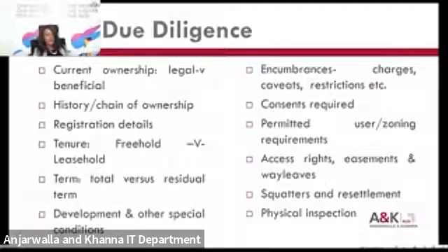And also they have to factor in and work out with the government the relocation and the alternative land that will be given to relocate the squatters and other people who are utilizing the land that is required for the project. And in some instances where this is not done right, and the people utilizing the land are not consulted, it does cripple the project, because there could be a challenge and resistance from people evacuating the land.